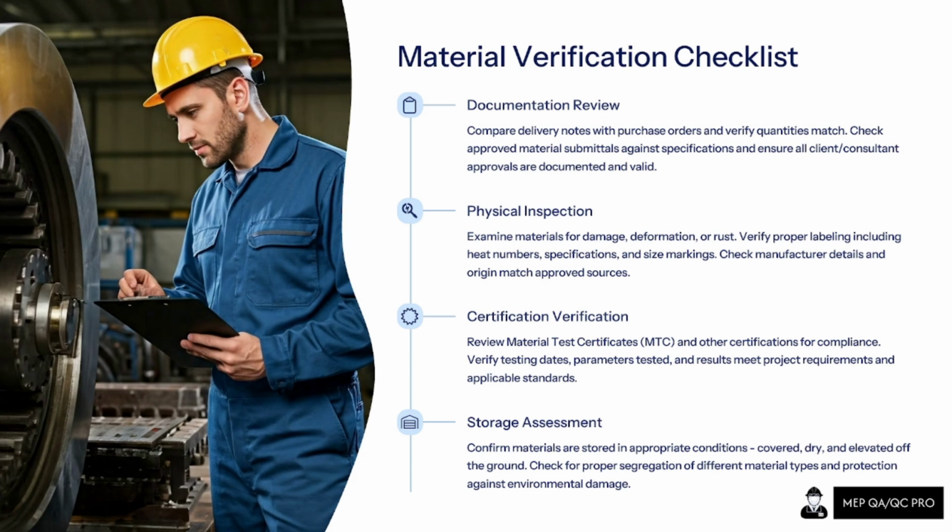Then once everything is verified and satisfied by you, the store management, whoever the management is, will keep the material in a prepared condition, covered, dry, and try to avoid any kind of dust on it, so that once the consultant or the client comes to do the inspection, they can check easily and properly without any hassle. So that is all about the verification of any material arriving at site, as a pre-installation checklist.